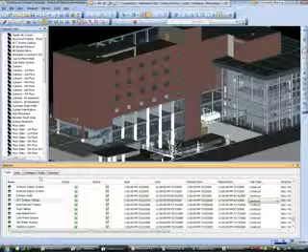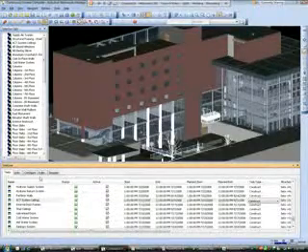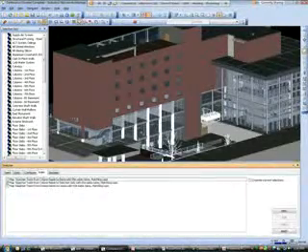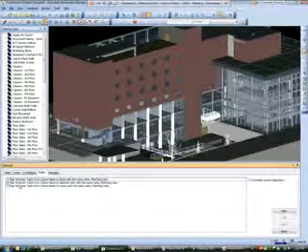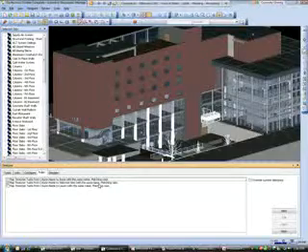Within Navisworks, there are rules that we can create that allow us to link some of these items automatically. Therefore, it takes off some of the effort of having to go back and manually link object elements in our model to the appropriate schedule task. You can see I can create a simple rule here. It says map timeline task from column name to selection set with the same name, matching case.